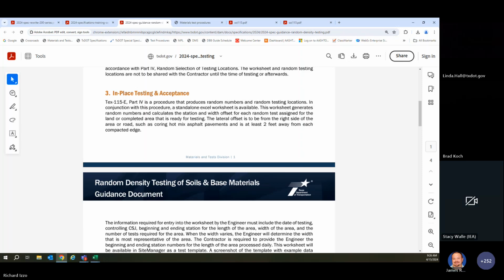Yeah, but the contractor's going to sit across from you and say, well, you can only test me in that random location. I would just argue that that's not what the spec says. It's never said that, and even with this random location being what the feds want, right? I mean, when you do hot mix, you're held to a random location. But what do you do whenever one of those things fails? You don't go back and test. If you have a failing section, you're no longer just told, oh, you can only test the random locations. Once something fails, you're allowed to go back and do whatever you want. And they don't argue with that on hot mix.